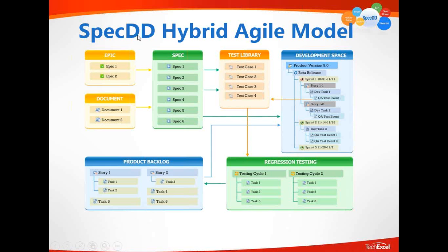If you think about an Agile project with multiple Agile teams, this development space consists of multiple teams, each running their sprint, and the integrated working software really needs to be tested by a coordinated but independent QA testing team with regression testing purpose. And then such testing effort helps you to populate more of the defects in the product backlog.